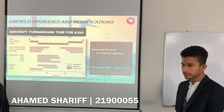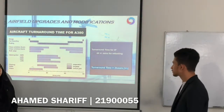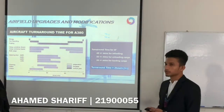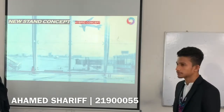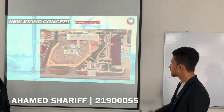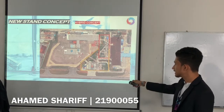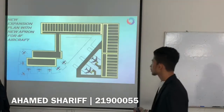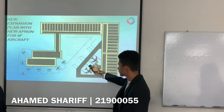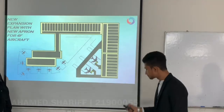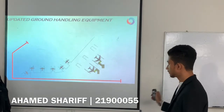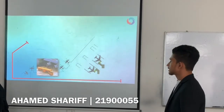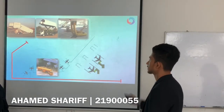The total turnaround time is approximately two hours for the Code F aircraft — 48 plus or minus minutes for refueling, 33 plus or minus minutes for unloading cargo, and 39 plus or minus minutes for loading cargo. The new concept we are implementing is a hybrid approach. This hybrid consists of the existing pier concept combined with a new linear concept, resulting in a hybrid pier-linear layout.